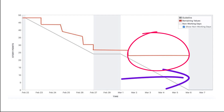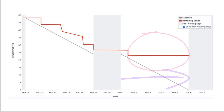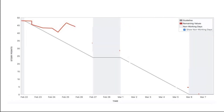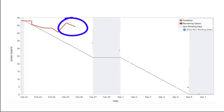Pattern 2: This burndown shows that work started as usual, but after the first few days an arcing curve appears in the chart, which might indicate either that the initial estimation of some tasks was not correct, or that more scope was added. Further investigation will lead to answers. We will now see how to view burndown charts in Jira, followed by understanding what burn up charts are.